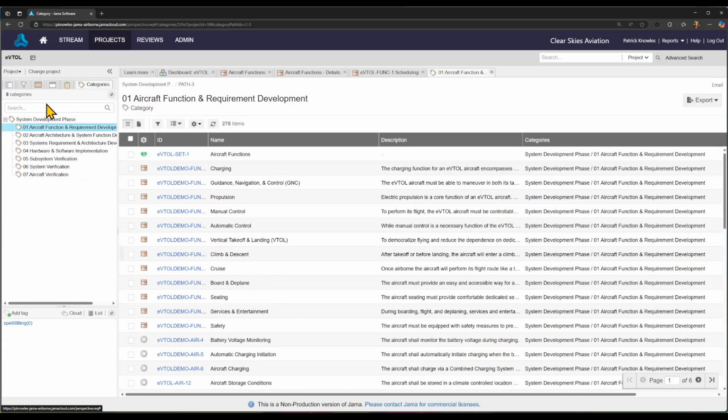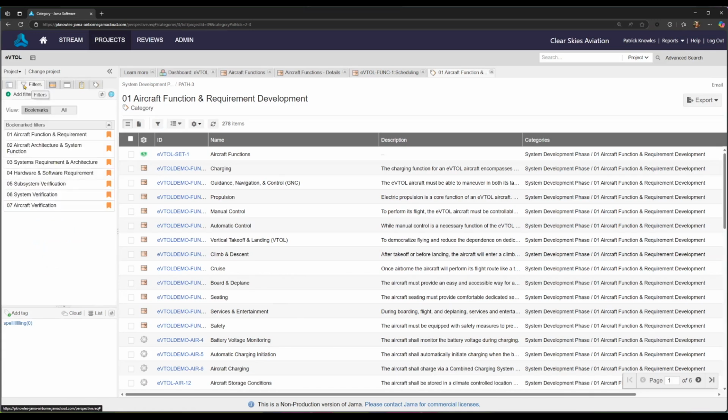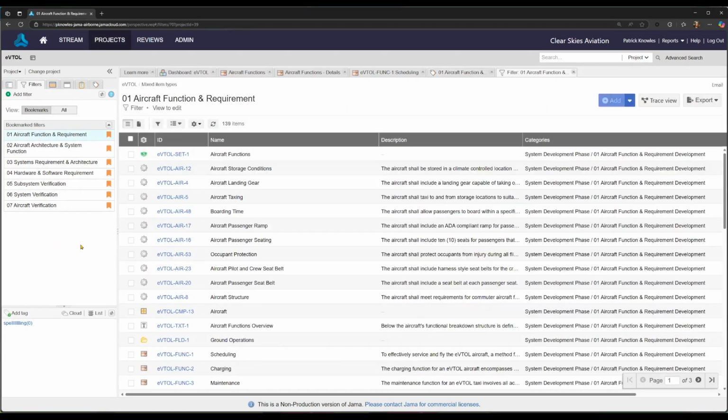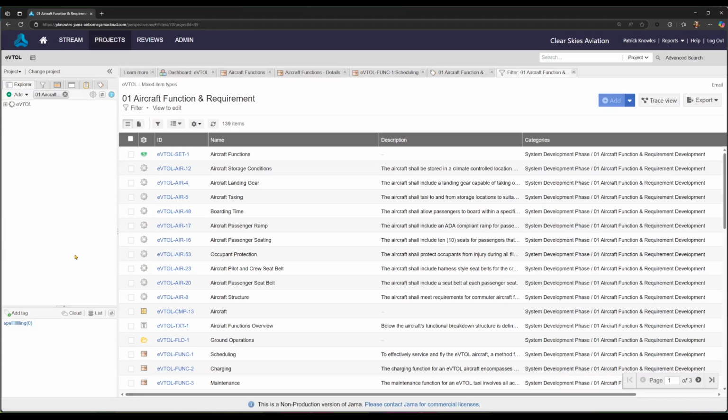A best practice for viewing categories is to set up filters. By developing filters that narrow in on the information due at the upcoming milestone, a team can target that work and ensure it is effectively completed. Once a filter is created, the user can even utilize it to narrow down the project's Explorer by right-clicking on the filter and selecting Apply Filter to Explorer. This will automatically sort the Explorer to only display the information within the specific filter.